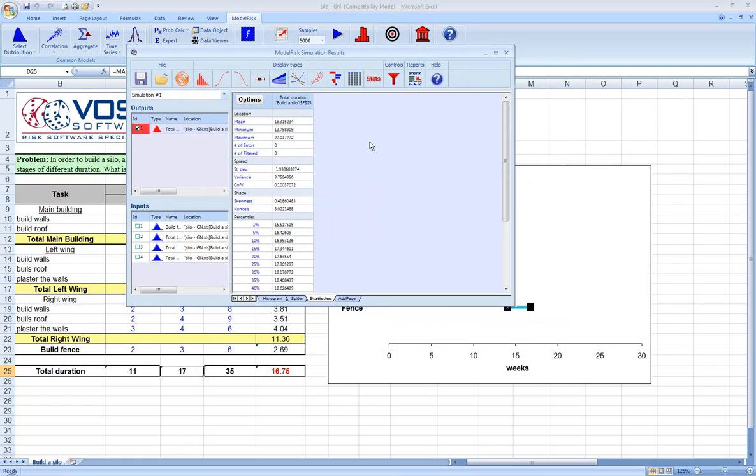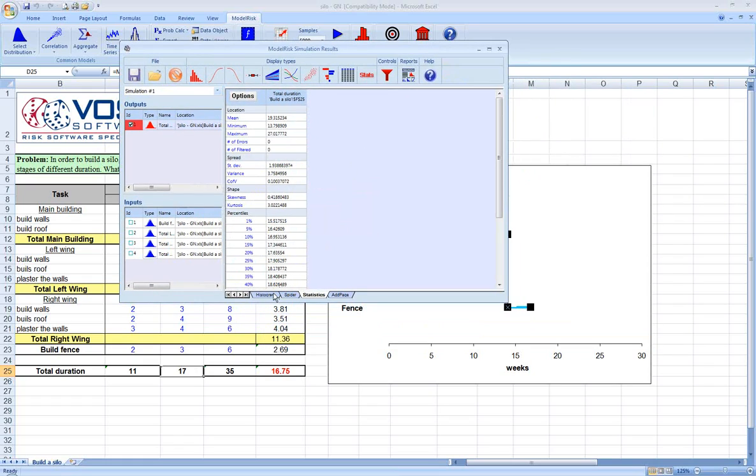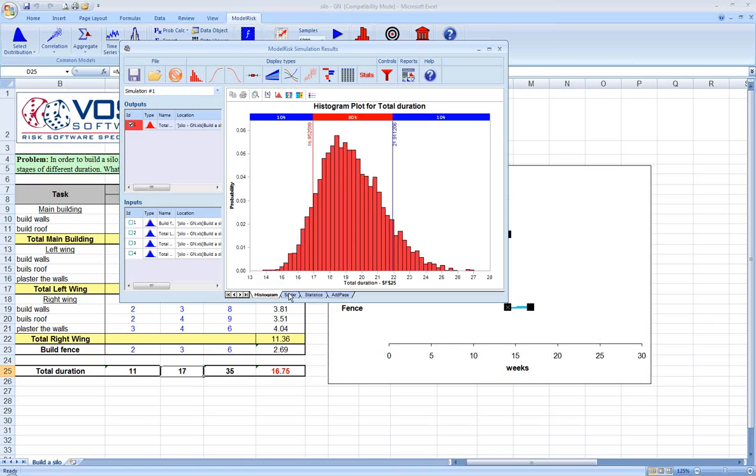A very nice feature of ModelRisk is this results window. If this was an analysis you had done and you wanted to report to your customer that it was really going to be an average of about 19 weeks and could be as high as 27 or possibly higher weeks to complete the duration, you could click the Save button.